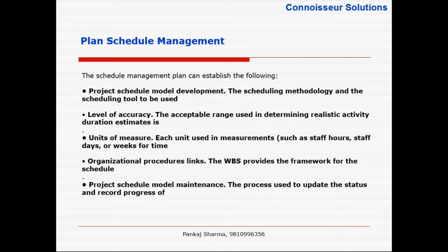So basically, the lower you go with the task. When you go from work package to activities and tasks, you should monitor or be able to report on them daily. Absolutely. The basic purpose of day-level decomposition of activities is that at the end of every day, you update your schedule. That's important. A lot of people don't take it seriously. There should be a habit that at the end of every day you take inventory of whatever you have done and not done, and if required, replan. So schedule monitoring and status updates should be a daily thing.